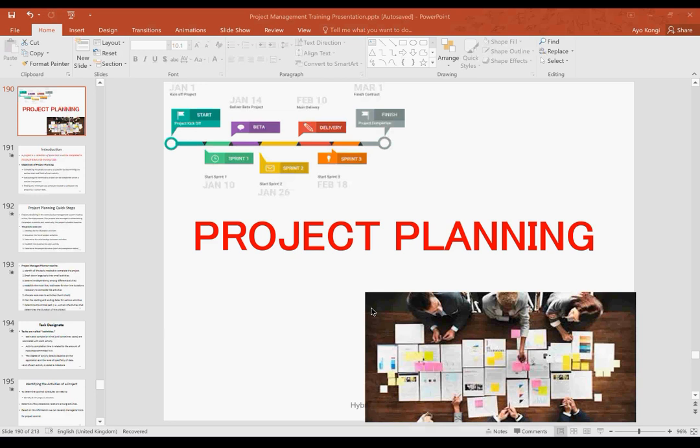As a planner, I'm writing it inside the schedule management strategy to say any activity that is more than 20 days must be broken down into smaller durations. So the maximum days you can have for one activity is 20 days. Don't forget, I'm only saying this because that is a planning standard. With an activity that is more than 20 days, you have to break it down. Does that make any sense?